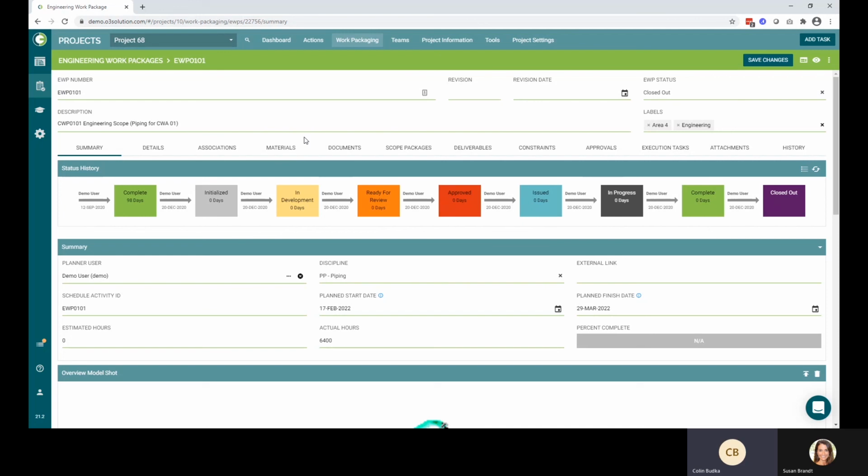Doing so allows us to identify our dependencies early and identify any potential blocking items so that we can manage them before they become an early schedule delay on the project. We can also create early mitigation plans in order to address any issues, and again, keep that schedule moving, making sure that we can stay fully productive across all of our engineering teams.